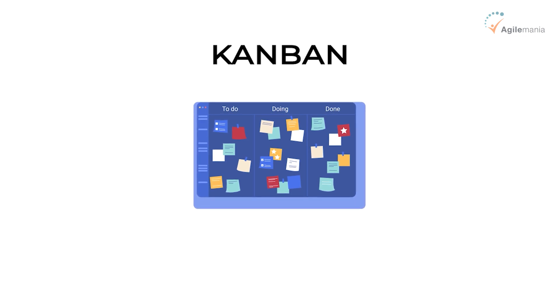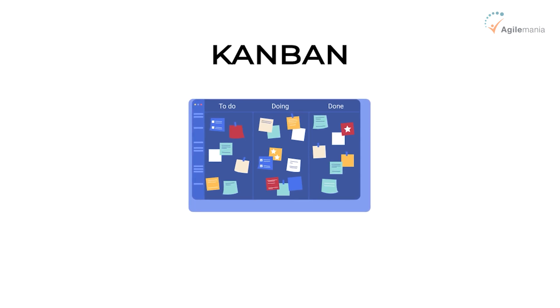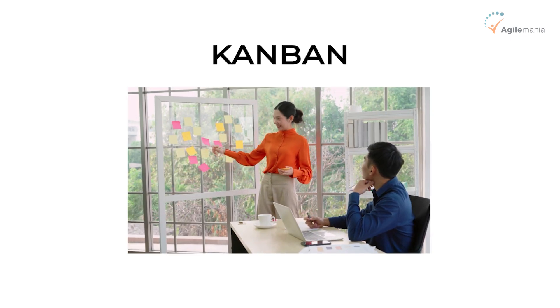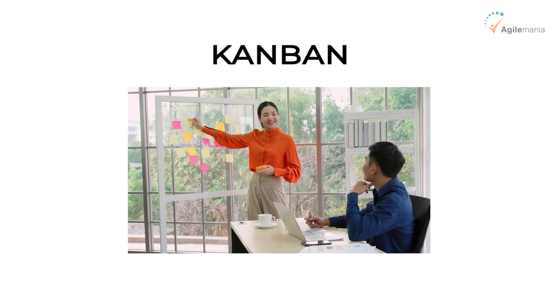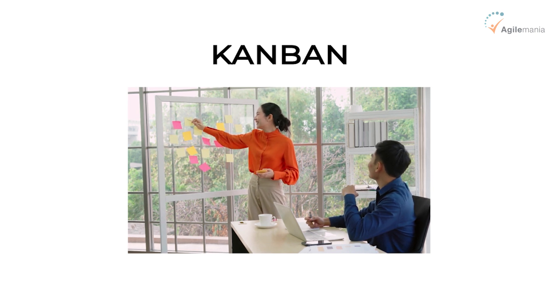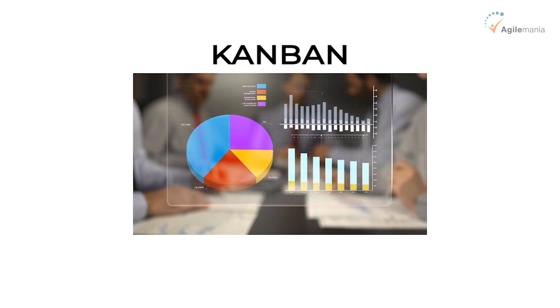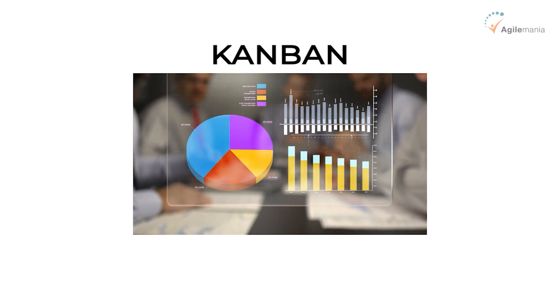Kanban comes from Japan — it comes from the Toyota production system — and technically it is not a framework. It's more a way of working, a way of looking at the end-to-end process of how you are delivering work and constantly optimizing and evolving it, rather than coming in and saying there's a new process and a new way of working that you should start following. So in Kanban you are trying to improve the flow: how do we visualize all the work, how do we minimize the amount of work that is in progress, and how do we optimize delivery? Some frameworks give you processes, some give you more practices than processes.